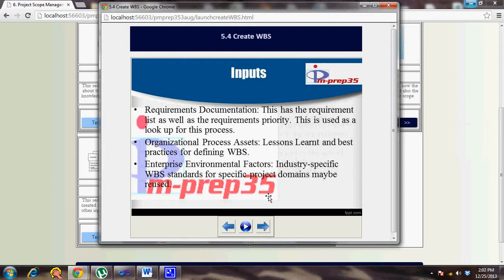So the baseline is nothing but an approved number given by somebody in the level of authority to approve, like for example the senior management or a sponsor or sometimes the customer, who says, okay, if I say that the scope baseline covers these things and he's happy with the boundaries that the project will cover, and you have covered everything that is needed for this current phase, then he gives a sign off. So that's where the baseline is very important. It's approved in nature, and you cannot change the requirements within it or the scope within it.